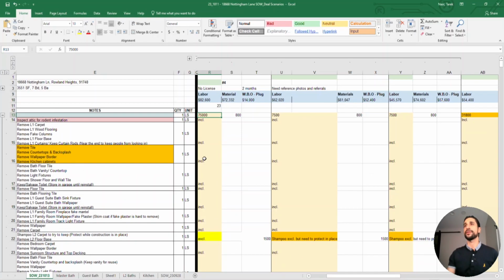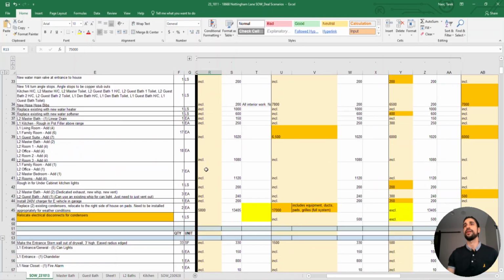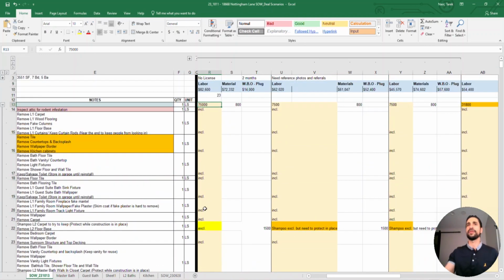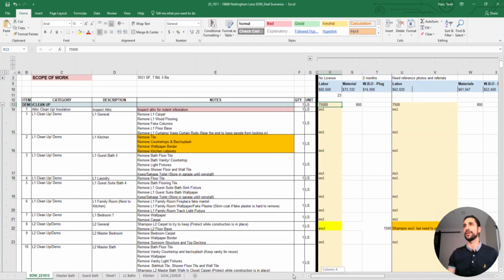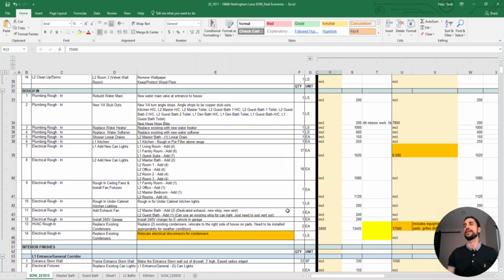So some contractors are detailed and want to give you a breakdown of the line items. Some of them are lazy and just say, for all this, it's going to take $40,000 worth of labor. That is not the sign of somebody you really want to work with. That means they're just taking the list and throwing a best number to it, and they're not really following your directions. Of course it's a lot of work to give you line by line item, but you could have them give it to me in chunks. So for example, contractor A, okay, well just tell me how much it's going to cost you to demo. Usually you can get it in that fashion.